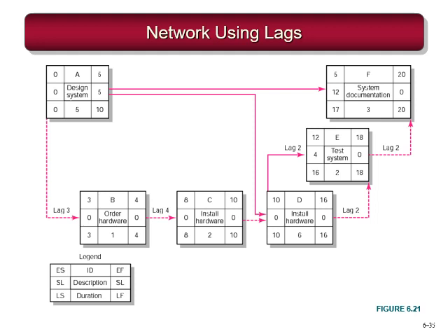So we have seen this network before, and in that network it's possible to introduce a lag. So for activities A and B, for start to start, there is a lag of 3 days. So that's the relation. It need not be an end to start relation. It can be a start to start relation.